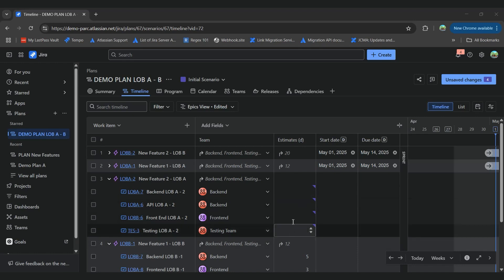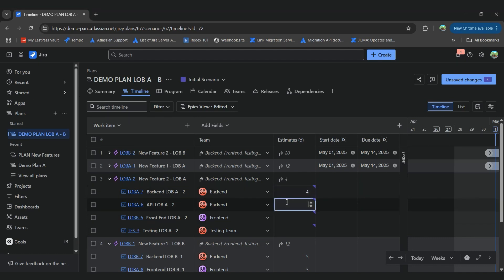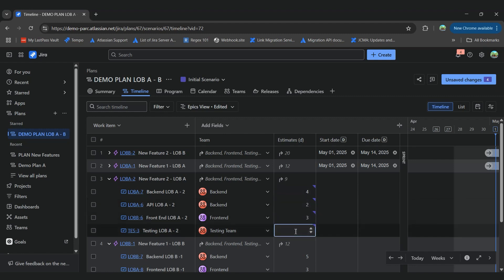For example, here we can assign a bunch of estimates to our stories, such as 4 days for this task, another 2 days for the API development, 3 days for the front-end theme and another 3 days for the theme.